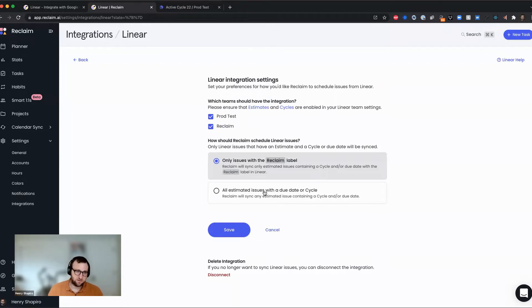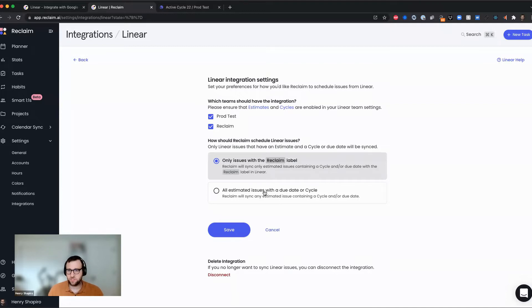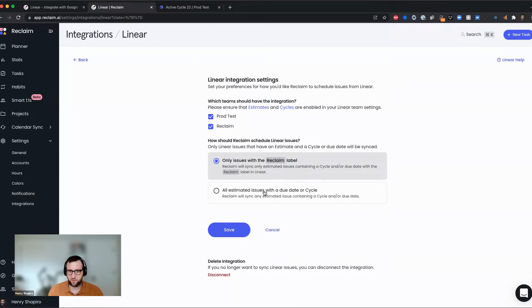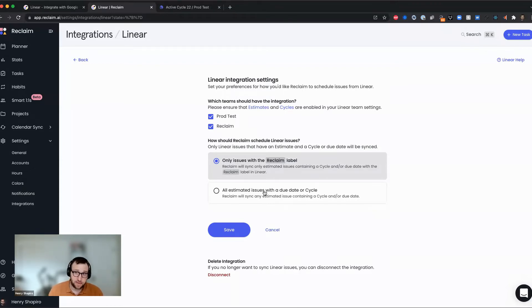And pausing on this particular topic for a second, all of the issues that Reclaim will sync from linear to your calendar have to have an estimate. And they have to either have a due date or a cycle associated with them in order for us to schedule them. The reason for this is we need an estimate so that we know roughly how much time to block on the calendar.